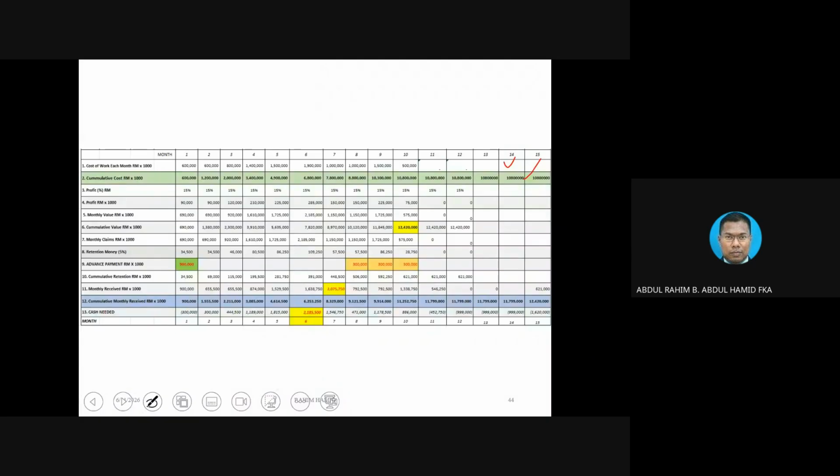Then you are going to get the values. Okay, you list out the profit first, and then remember, when you want to calculate, you calculate the profit out of the given cost first. 600,000 times 1.15 times 15, you are going to get 90.